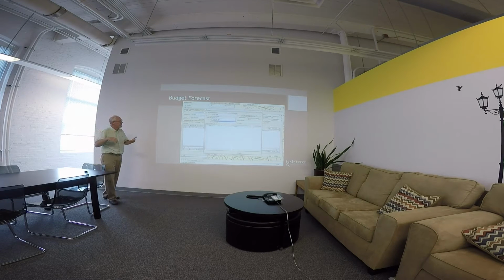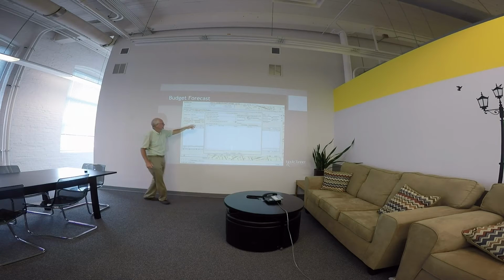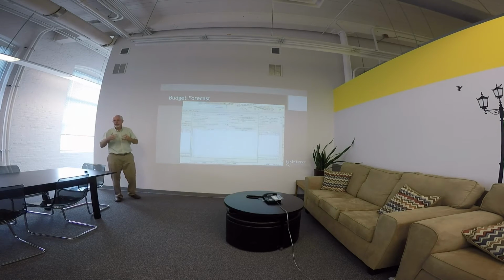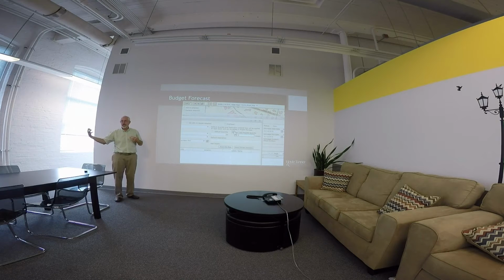My job type is going to be the comprehensive, which is what they call the extent of the pipe, and I'm going to replace those pipes with the same diameter, with larger diameter. This one says replace with the next larger diameter PVC pipe. So it's able to bring the measurements from the GIS, which represents the length of the pipe, to calculate my cost.